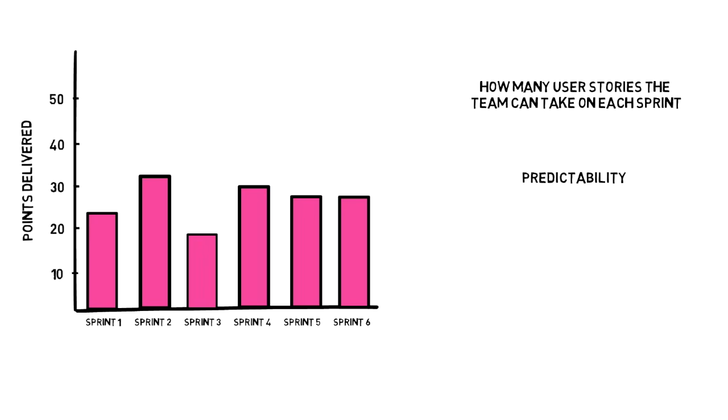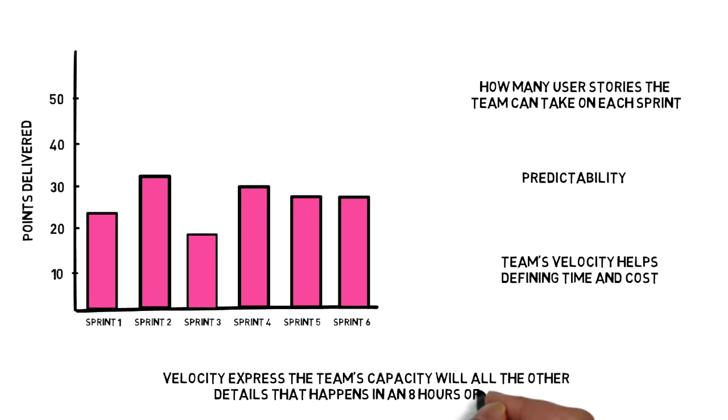Tracking your team's velocity helps you turn your estimation units into actual time and cost for the business. This can be simply done when we know the velocity of the team. Another advantage I'll point out about using story points and tracking velocity is the way they naturally account for the difference between an ideal 8 hours workday and the interrupted, full of meetings day. Team velocity represents the team's capacity with all the messy details of real-work situations already accounted for.